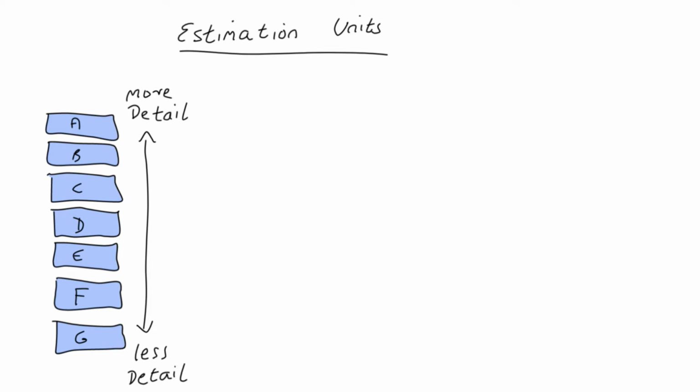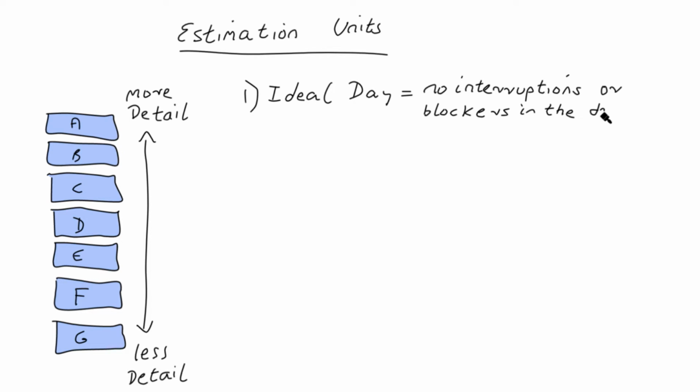So here are some of the more common options when estimating stories. So the first option is to use man days, and this refers to a working day of effort. And the second option that some teams choose to use is t-shirt sizes. So a t-shirt size, as you know, would range from small, medium, large to extra large, and these are also used to estimate stories. And they're appropriate if you want to do high-level estimations. That is, if you have a lot of ambiguity in the details and don't want to spend too much time in estimating stories at a granular level.